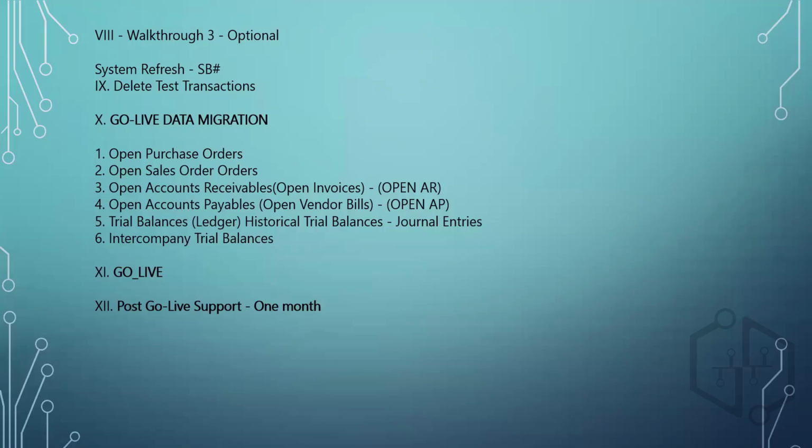I'll explain that once again. So usually in NetSuite implementations are done this way. I mean, there is a production account, okay? So the entire configuration is done in the production account right from the beginning, okay? So normally in other ERPs, like LN ERP or SAP, what happens is there is a sandbox which is built, okay? And then it's called a golden account. Right before the go-live, they dump the entire data into the production, and then that goes live, okay?